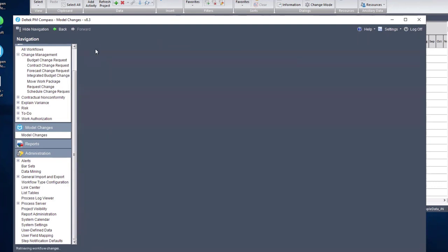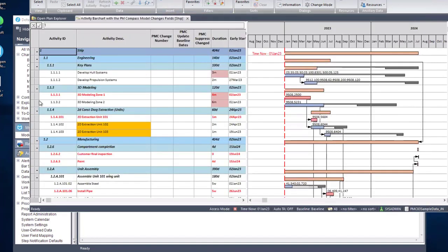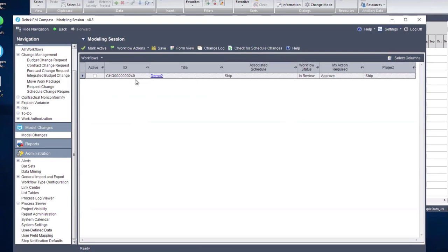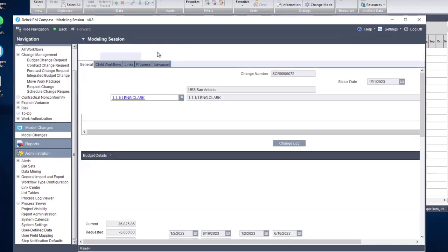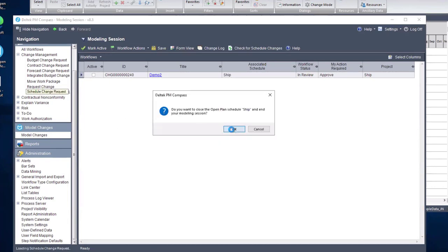What we're going to do is replace the entire work package, because let's say you have 3 activities linked to one work package, and all 3 activities have that same resource ABC on it, and you delete one of the activities. How do you know how much of that resource out of that original work package is deleted? The only way to do that is to use a replacement. What we're going to do is wipe out the whole work package and add back in what is in the schedule.